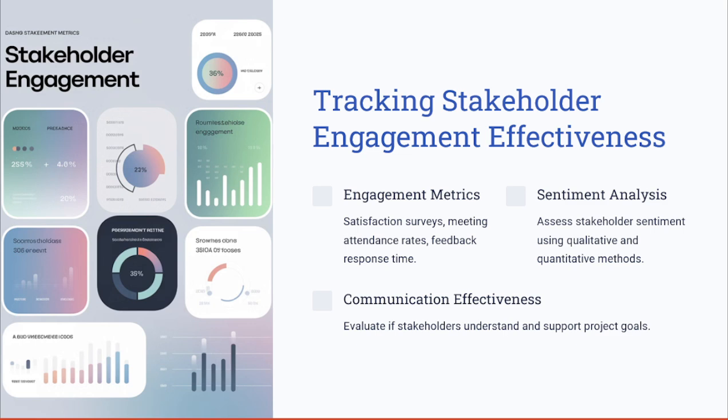To assess some of these engagement metrics, for example, you can conduct a stakeholder satisfaction survey to understand whether your stakeholders are satisfied about your project and your communication. Also meeting attendance, as I mentioned, and participation rates. What else do we have? We have the feedback and the response time. The next tool here is sentiment analysis, using a qualitative and quantitative method to assess the stakeholder sentiments.